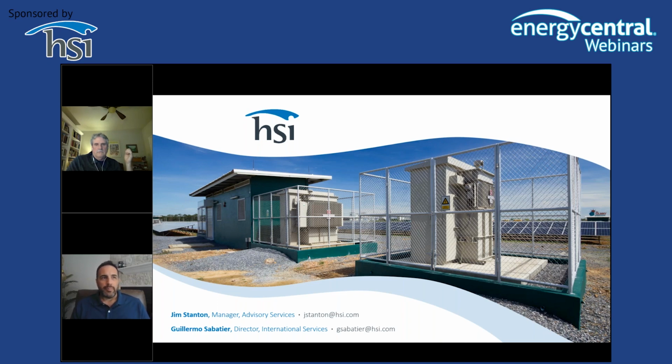The important thing to remember, in my experience, is that one of the biggest challenges is from these construction contractors. For the most part, they know what data is being provided and why it's being provided. Typically, PRC-005, FAC-008, and those standards that have to deal with the commissioning reports for these relays are of most importance. But it's important to still demand, or negotiate a pretty strong contract, making sure that you get clear, accurate, successful reports from all those relays.